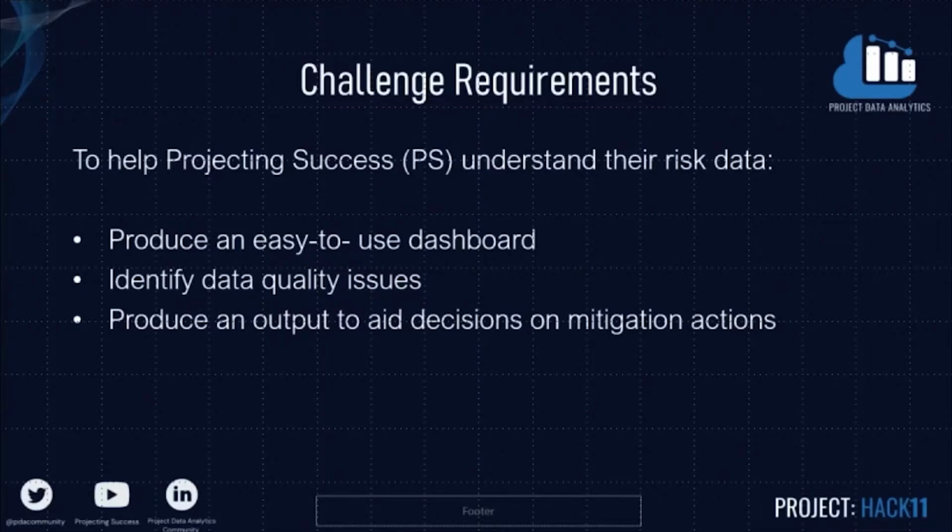This will be presented by the project controls assistant to the project manager and functional risk manager. It will provide a threshold figure which should not be exceeded for a mitigation. This will help inform the functional risk manager and project managers' go or no-go decisions.